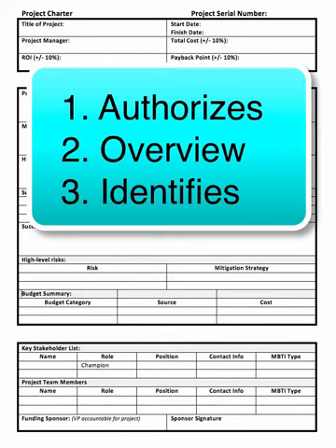The project charter is usually used for three different reasons. Number one, it authorizes the project. Now, when we fill out the work request, we're just saying this is a good idea. What do you think? And when the project committee comes back and says, we think it's really good, they issue a project charter. So this defines the project, it authorizes the project, it budgets the project, it does all kinds of things, but it actually gets the project underway.